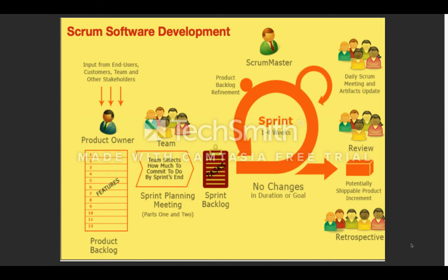A product backlog consists of a collection of user stories and is almost similar to a wish list of what the product feature should be. The product owner owns the product backlog and in collaboration with the team develops the user stories and the requirements for the project. The higher priority items will be on the top of the backlog and be issued to complete in the earlier sprints. Once the sprint has started, there will be no changes to the requirement, and that is very important because otherwise the sprints would be chaotic.